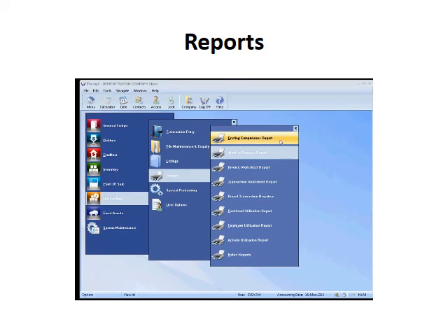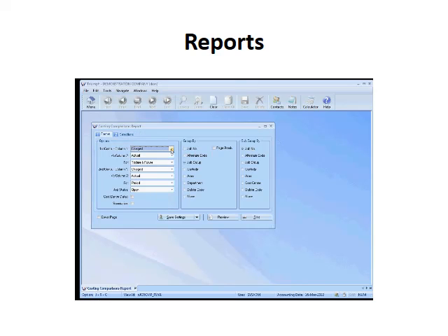Looking at more reports, one of the ones that's quite commonly used is the cost comparison report. In the cost comparison report, you get the ability to actually now start getting comparisons between different numbers. So we can see what the theoretically charged figure is, what the actual cost has been, what we have invoiced so far, what we've quoted, what we've budgeted, what we've got committed, and we can compare between them. We can compare them for the month, the year, to date, future. So if I just do this one period, and we'll do this to date, I can then choose to do it for job number by cost centre.